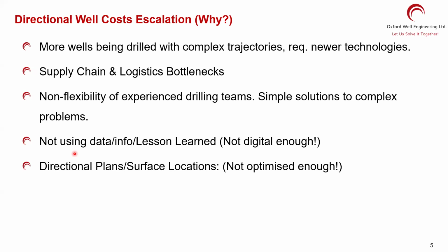And when you talk to them after a few more months, they have a different target again. So this is something that we need to be aware of: ask them whether this target is better, or can we move the target? If you move the target, you move the well shape. If you move the surface location and the targets together, a lot of the time you can. When you are in the pre-planning stage, when they have not confirmed everything, you can do a lot of things that you cannot do later.